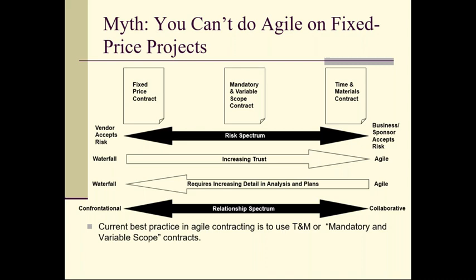So we have this list of maybe 200 items. We're not going to fit all 200 items in this project. That backlog gets prioritized into the should-haves and then the nice-to-haves. And we arbitrarily choose a line that we think is feasible or achievable. We're going to get all of the should-haves done and a certain number of the nice-to-haves.